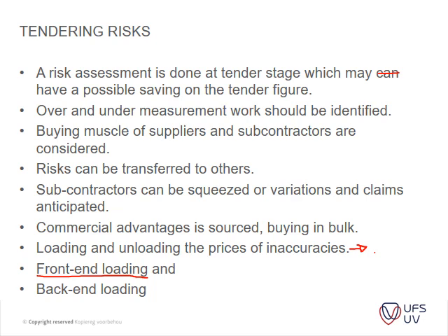Obviously, you do that discreetly and all, but with the goal of you only make slight changes at the front, because the bigger your loading at the front, the higher your risk will be, because it might happen that when you remeasure your work on site, that your excavations might be much less than you anticipated, in which instance you will actually lose on your contract, because now your back end items will not have the necessary rates or bulk of finance to actually carry you through the project.